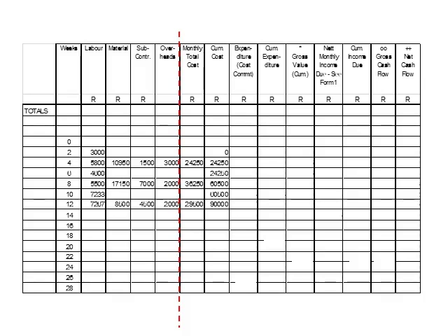Payment may take place at the time of delivery, or it may be delayed, depending on what was agreed in the contract to purchase. We know that for this example, payment to material suppliers and subcontractors are delayed for 30 days. In this calculation, we need to make provision for this delay, to reflect the true timing of the outflow of an amount of money. The result of this calculation will therefore reflect the timing of cash outflow. This forms part of cash flow, and is one of two activities that take place within cash flow. The other is cash inflow.